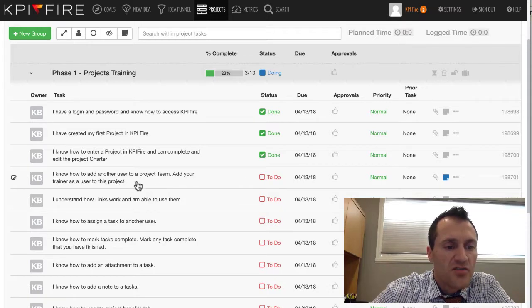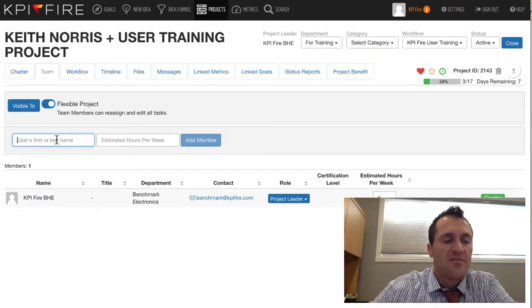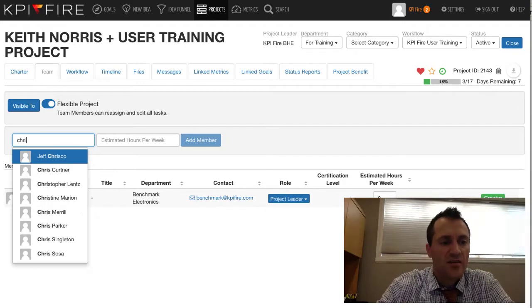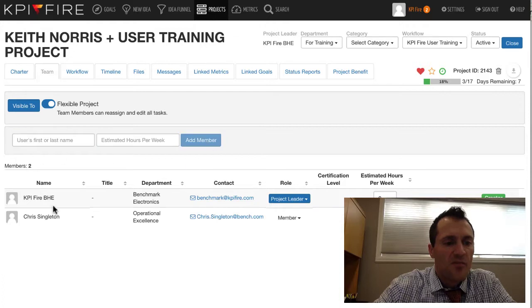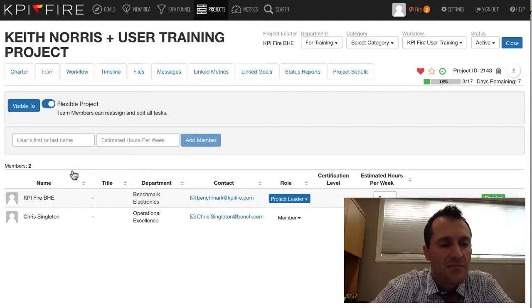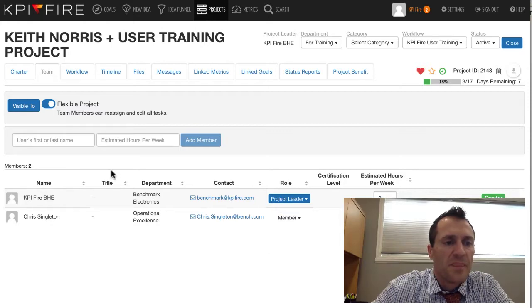Add your trainer as a user to this project now. So what we're going to do is go up to the Team tab, and if my trainer is Chris, I can add Chris as a member of my project. Once someone has been added as a member to my project, I can start to assign tasks in that project to them. You'll notice that anybody who's on a project can be given one of these 4 roles: project leader, sponsor, champion, or member. There are various different responsibilities, access, and control based on the role that you give someone.